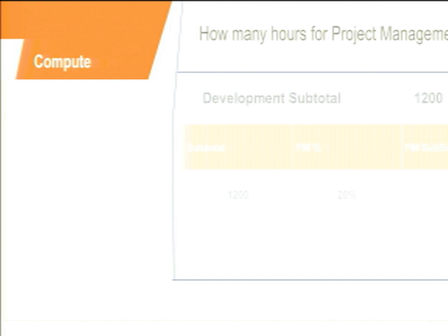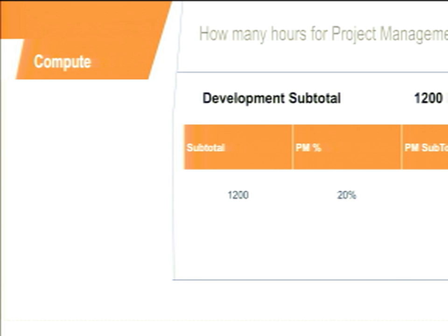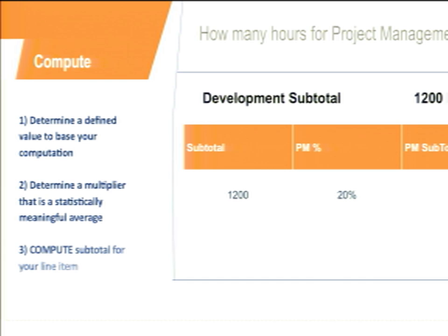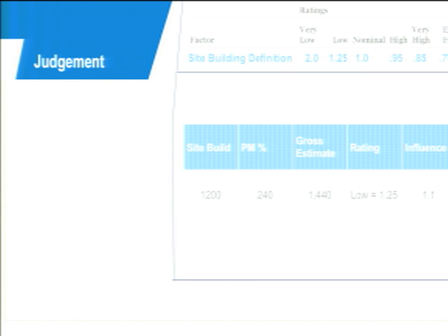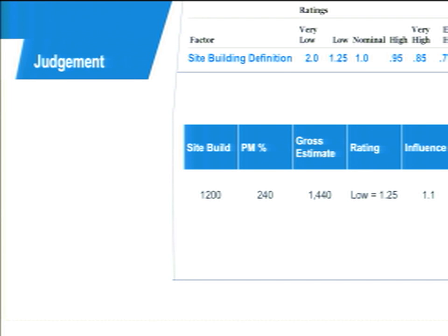For computation: if you've estimated 1,200 development hours, you can apply a percentage factor — like assigning a percentage of the total project to project management. That percentage can also be a calibration if you're pulling it from historical data on how much PM or QA typically consumes. Judgment is where you place your risk factors — maybe assigning a multiplier to a line item you're uncertain about, to scale it up or down accordingly.